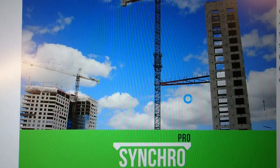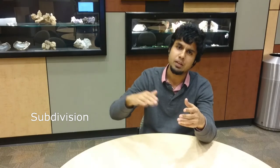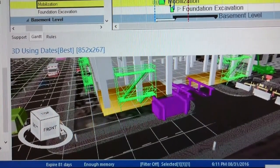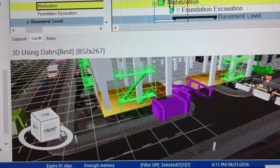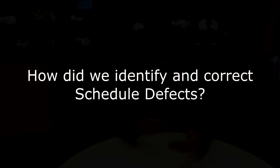Building the 4D model — this is where Synchro comes in. First, we import the tentative schedule and the Revit model, which has already been exported into .SPX format. Then we subdivide all the objects based on heights so that we could sequence the construction according to the schedule. Then we link the corresponding activities to the objects to be constructed in the 3D model. Synchro automatically recognizes this link between the activities in the schedule and the objects in the model to generate a 4D model.